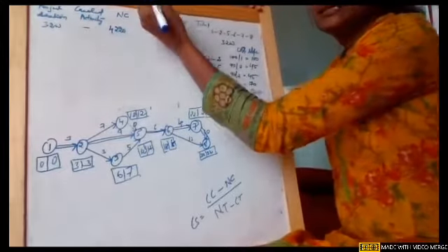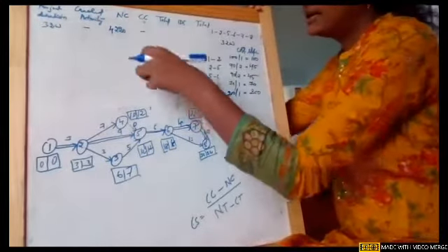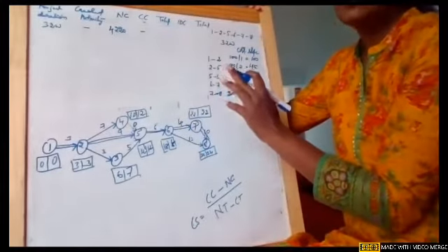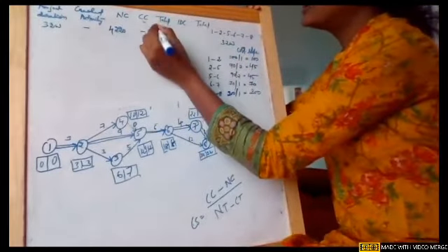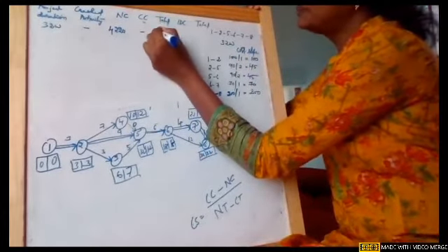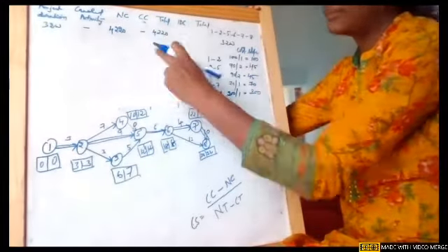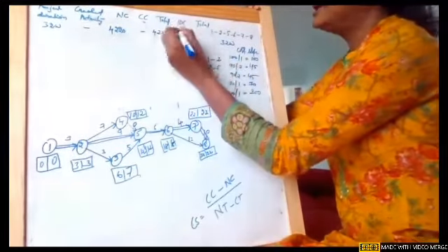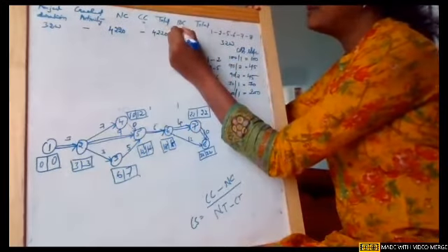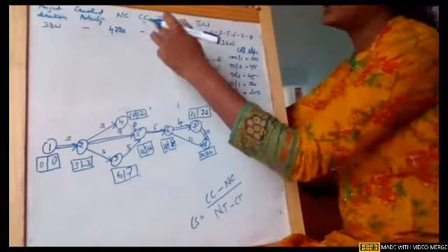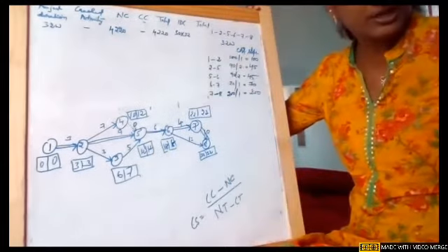As there is no crashing, the crashing cost for the first section will be empty. And then the total cost as of now, because there is no crashing cost. I'll tell you how it will be applied when crashing is done. And indirect cost is rupees 50 per week. There are 32 weeks as per the duration of the network.